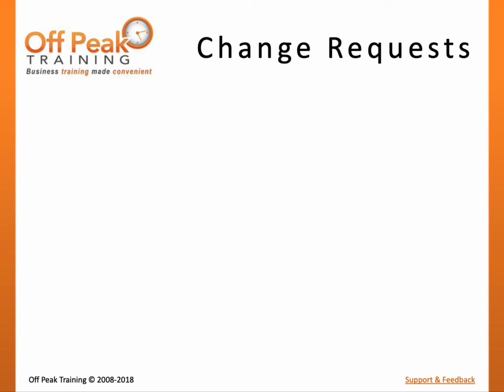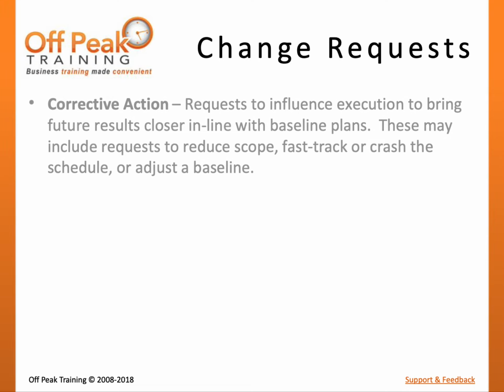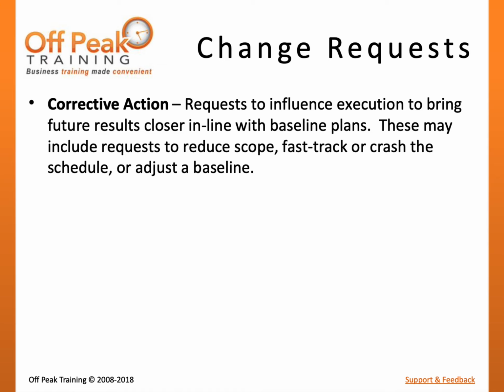These change requests can be further described into three major categories. Corrective action are requests to influence execution to bring future results closer in line with baseline plans. These may include requests to reduce scope, fast track or crash the schedule, or adjust a baseline.